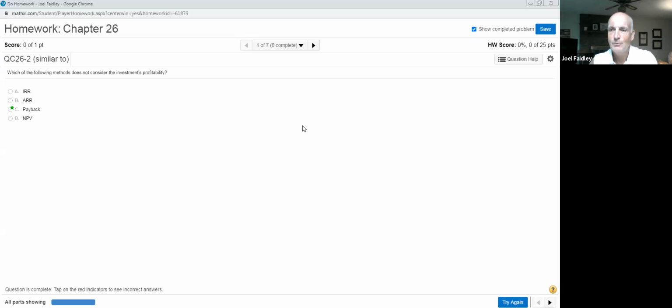And all it is, what is your total investment is your numerator, and the denominator is what is your cash return each year over the life of this asset that you're planning to invest in. And so all it does is give you a number, and the payback period is in years. So if I'm going to spend $100,000 on a capital project, and I'm going to have a $50,000 return each year, what's my payback? 100,000 divided by 50,000 a year. It's a 2-year payback. It's that simple. So let's go ahead and go through these.